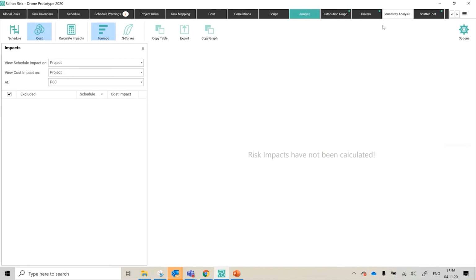But as I said, when you want to evolve the concept further, you go to the sensitivity analysis. Just to explain what this is, you may have already done this in previous projects yourselves. This is essentially where you are asked the question, but how much is that affecting me by? So you go, well, I don't know, I have to rerun the model, but this time without the risk on, so I'll be able to measure the delta. If I was looking at P80 previously, I'll remodel it without that risk and see what the P80 now looks like, and whatever the delta is, that's the answer. So this automatically does that for you.